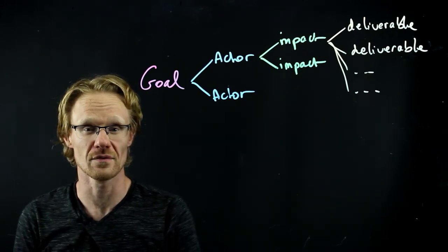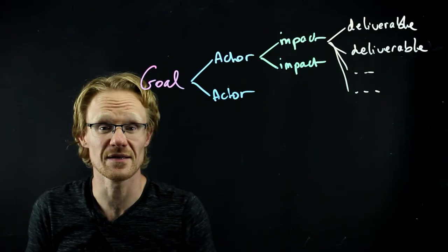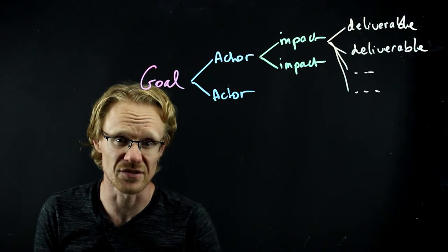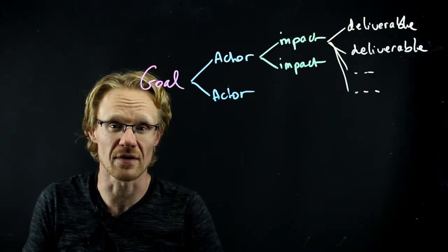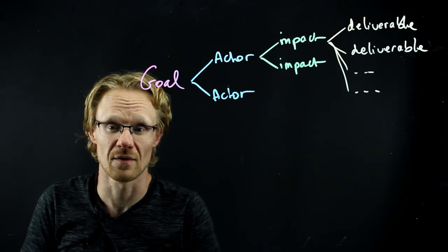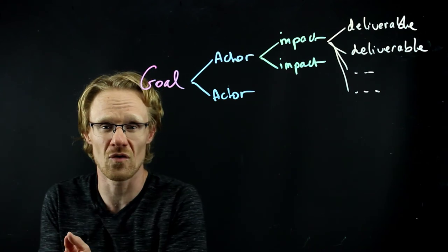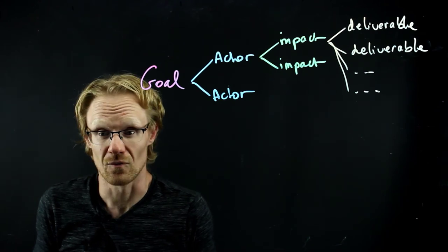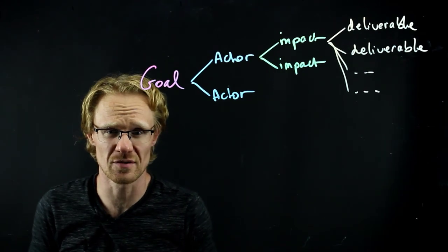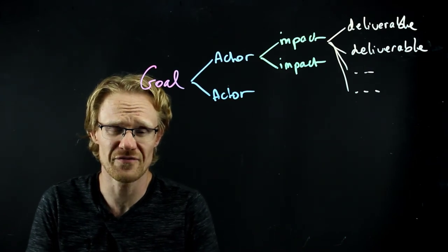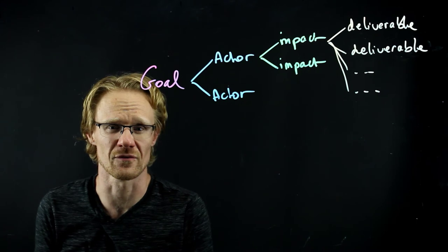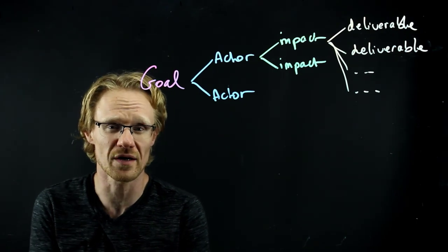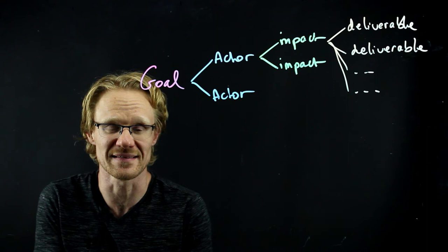The second reason this is so powerful is the impact aspect. Let's say you have delivered something from the list of deliverables from your backlog. The question you must ask yourself is: what's the change in user behavior? What's the change I expect to see? What's the impact on the user? Have they changed their behavior? Is there a before and an after the feature? In our previous example, we talked about sharing data with colleagues. Did people not share data at all before the features you implemented, or did they share data differently — perhaps in a very inefficient way, like with USB sticks? That means you want to have a metric, something you can measure, a signal that tells you that this is working, that the impact we expect is actually happening.